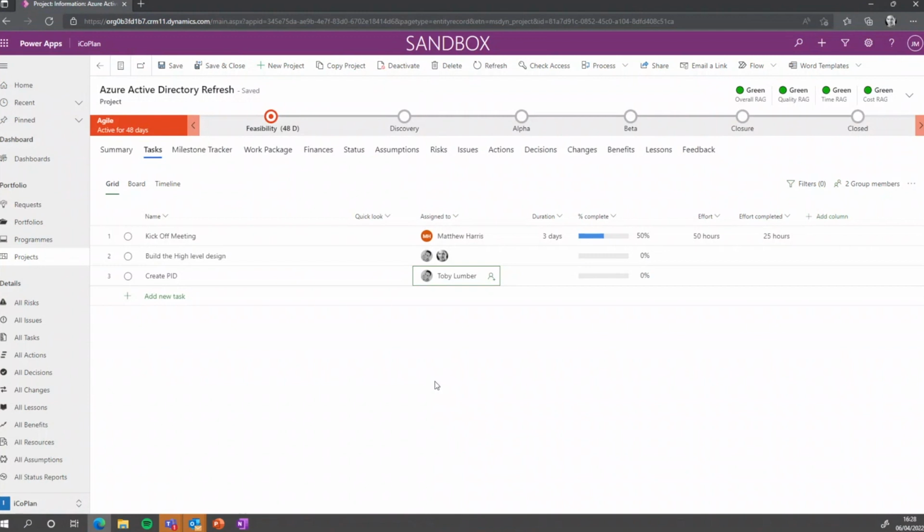You can't create a template within Project for the Web itself, but you can upload a Microsoft Project file directly into the system. So if you've got a big schedule in Microsoft Project, it's quite long, quite intricate, you can upload it into the system upon creation of the project plan in project.microsoft.com. But templates is something that this solution has the capability to do, but it just needs a little bit of thought if you wanted to utilize that technology.